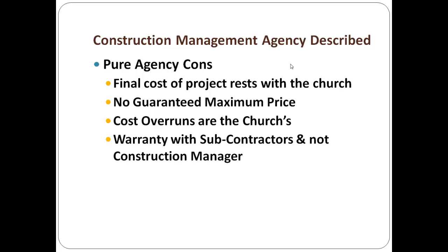you have to pay that addition. The warranty that you have is not with the general contractor, it's not with the construction manager, it's with the subcontractors. That's who did the work, and so the warranty is guaranteed by the subcontractor if something goes wrong. Now that can get complicated sometimes, I think. During the warranty period, when you have a problem and one sub says, well, it wasn't my part of the work that did it, this other subcontractor caused it, and it made mine go bad. And so, again, you can have conflict.